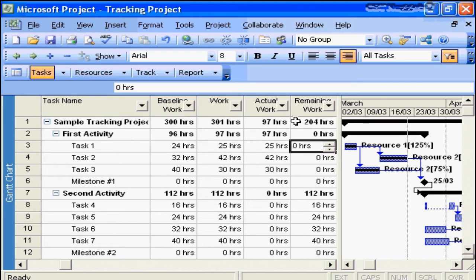This is the area that we discussed when we were setting up the project with Calculate Automatic or Calculate Manual. As you will see by the evidence of what Microsoft Project is doing for me, I have this set as Calculate Automatic. Only if you were having performance problems, if you found your application was running slowly, would you need to go in and set that to Calculate manually.